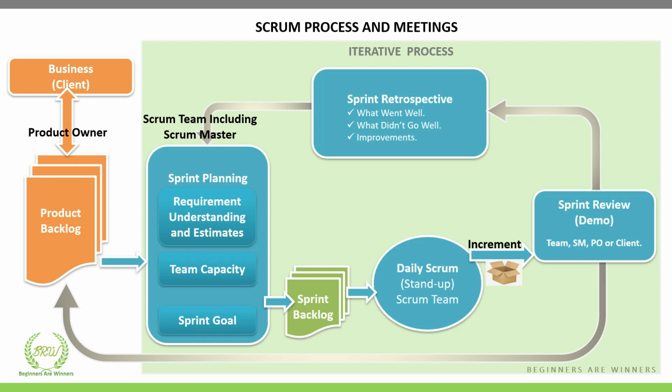And the whole team works together to deliver committed value through each sprint in an iterative way, which you can see in the blue boxes at the right side. So every sprint starts from sprint planning. Therefore, the first day of the sprint is reserved for this.